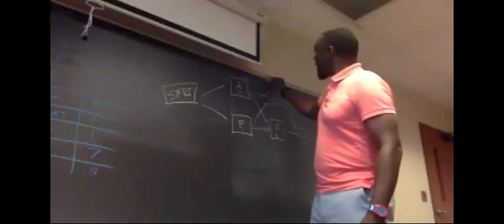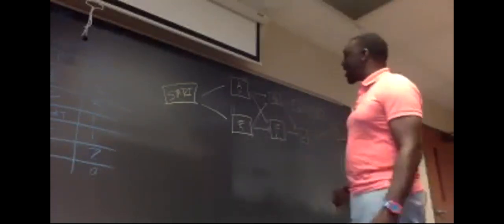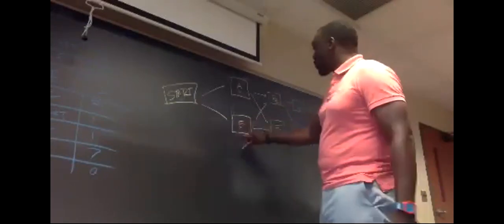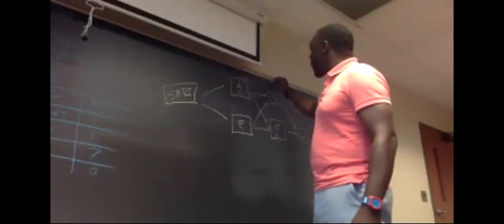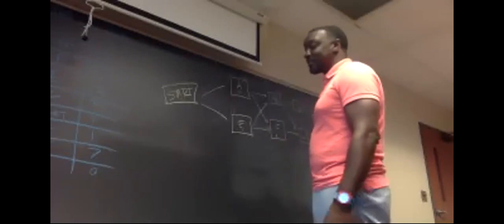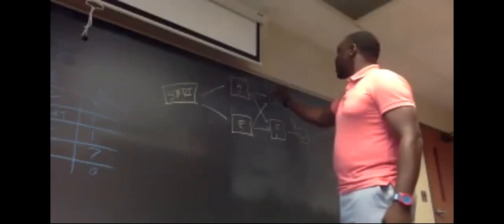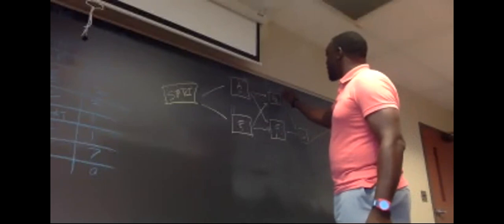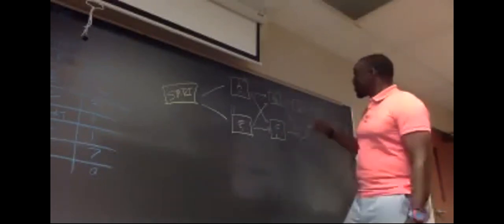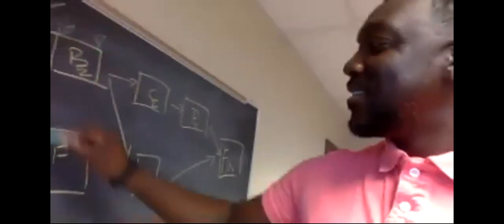So I got a 6, but I don't know yet. So I just cross it out and I see what's up. So I got 0 plus 1 is 1. So now I got a 1 and a 6. Which one should I take? The 6. So I bring the 6 over. 6 plus 2 is 8. Do I bring my 8 over? Wait. Can you hold on for a second? You're bringing the 6 over to the 2, right? And that becomes your 8 at the top. Absolutely. 6 plus 2 is 8. You got it.